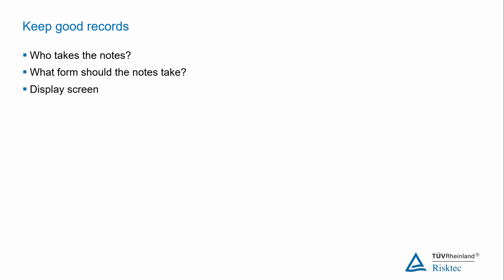It is usual for the notes to be made visible to the workshop team through the use of a projector or a display screen. This allows for people to check the notes as you go along and make corrections and avoids having to have detailed lengthy reviews of the notes after the workshop. If you are conducting a workshop across multiple locations, for example by screen sharing, then consider digitally recording the session as well so that you can refer back to it.